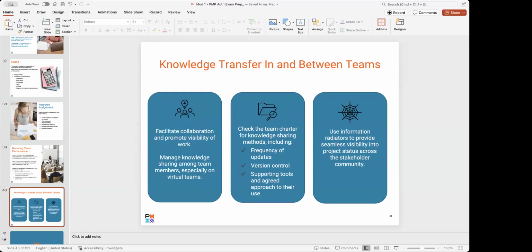And we also shared decisions that have to be made at different levels. So there are decisions that functional areas can make, and then there's a decision that has to be made by the president of the health plan, right? And so we overstepped our bounds last time in the project, so we learned quickly how to identify those types of business decisions that have to be made at a different level.